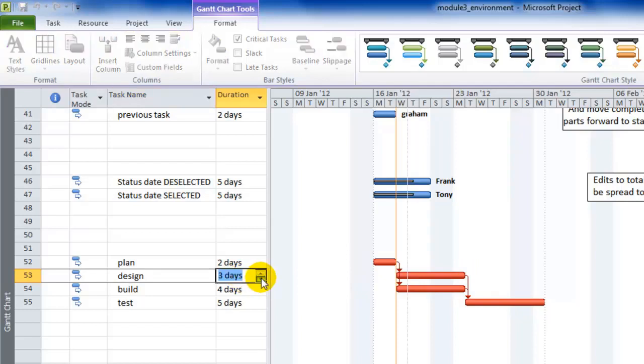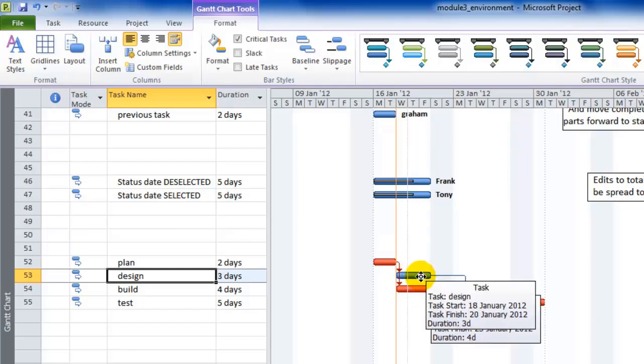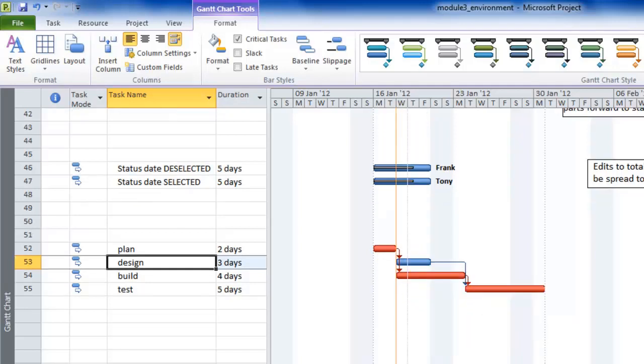So I ask you, in the bigger picture of a project, where you've got some tasks that are very near to being critical, you might look at this and say, that's not that important, it's non-critical, these are the ones I'll focus on. But this only wants to delay by 24 hours, and you've got yourself a problem.